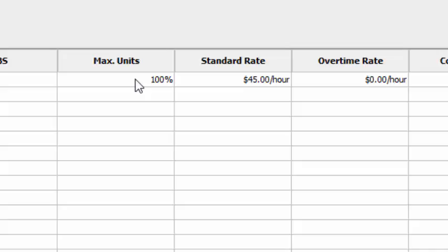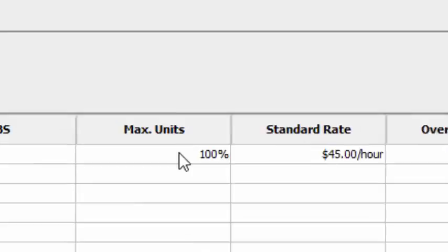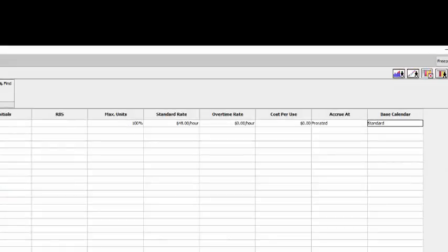The Project Libre program is open source, and it does not allow us to put people to work for less than 100% of the time. So if a person works for us for a day, we expect to get a full day's work. Other software like Project Pro allows you to select different percents of the day that a person works, even though he's assigned the whole day. As of now, we can't do that. So all of our people will be assigned to work 100% of the time that they're assigned to work, which is the way it ought to be anyway.